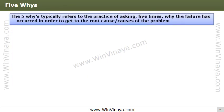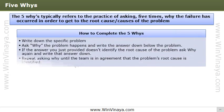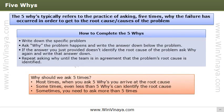The third and last technique we'll discuss is five whys. Five whys is a simple problem-solving technique that helps get to the root of the problem quickly. Identify the problem and start asking 'why' — what caused this problem? The answer to the first why should prompt another why, the answer to the second why will prompt another, and so on.